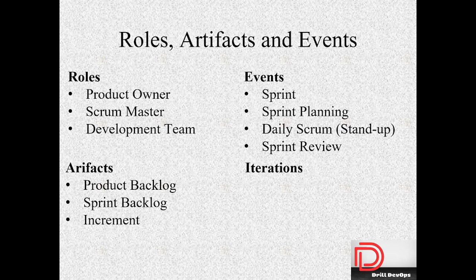if there are any blockages or any dependency issues, the Scrum Master will facilitate with the other teams. If any clarifications are needed from the product owner on the requirement, or if there is any dependency on any QA teams, development teams or DevOps team, he is going to facilitate and unblock the individual team member. That is where stand-up happens, and each day it could span from 15 minutes to 30 minutes based on the team's capacity.